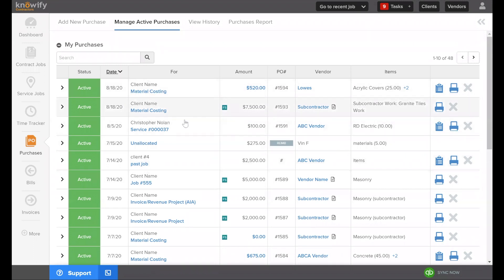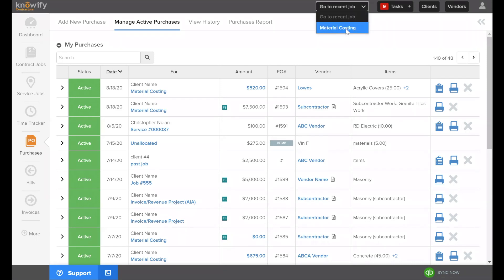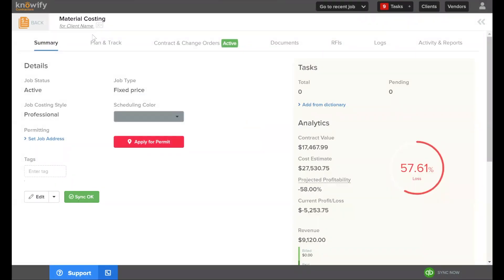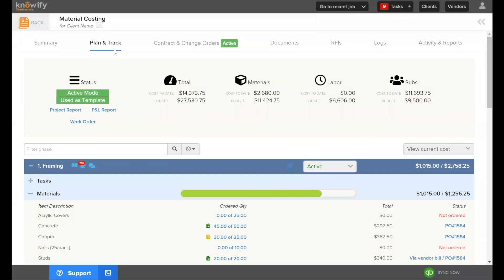I like to show the purchase creation process from the job level because we can initiate purchases directly from a project, automatically job-costing expenses to the correct job and phase. From the contract job section I'll open a project and go into the Plan and Track section, which shows how much the job is costing. By setting up a budget at the start, I can see exactly where I stand on each project at any given time — cost to date against my budgeted value.